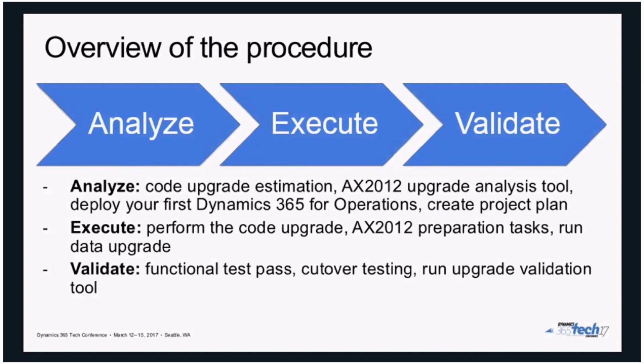That's also a very common question from customers. After we upgraded, how can we be sure that the upgraded data is actually correct? Are we missing something? Is everything okay, or are we good to go? Most of it is going to include just the testing of your resulting database and instance: functional testing, cutover testing, smoke testing, etc. But here we also have quite a few tools that can validate and guide you through the validation process as well.